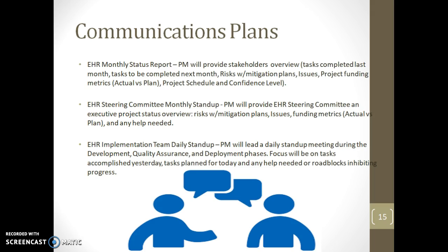EHR monthly status reports. The project manager will provide the EHR system stakeholders with a monthly status report throughout the duration of the project. This status report will include tasks completed within the last month, tasks to be completed within the next month, risks with mitigation plans, issues, project funding metrics, actual versus plan, and project schedule and confidence level.